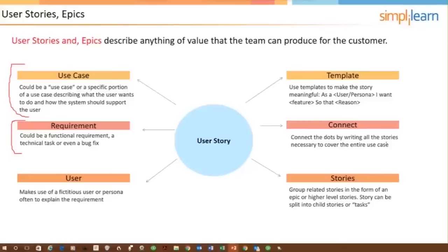Now, what could happen is that the product owner ranks these in priority. So this one first, then that one, then that one. And the team says, well, the only thing is that we have to do some development work before we can actually do user story two. And so what we really need to do is insert that before the second priority user story. And so the priority of the user stories in the product backlog, while it might start with just being simple functional user stories coming from the product owner, will evolve until it includes some other things that are also considerations when it comes to priorities, because of successor, predecessor relationships, dependencies, and things like that.